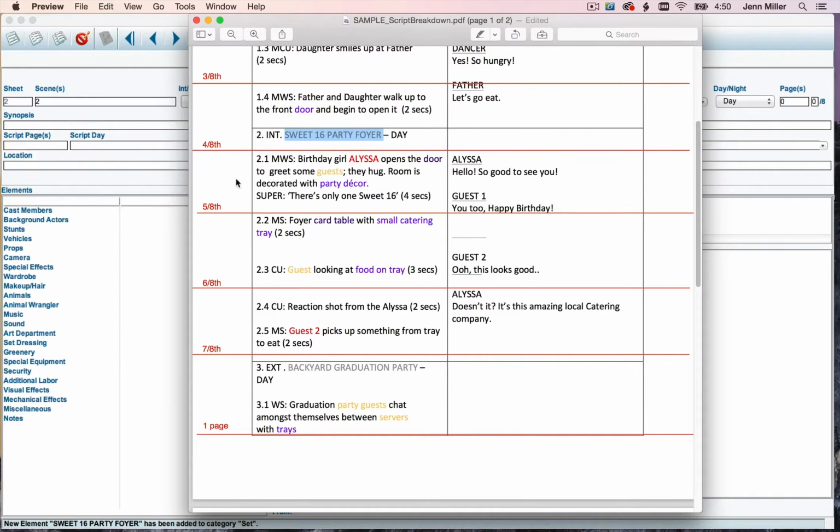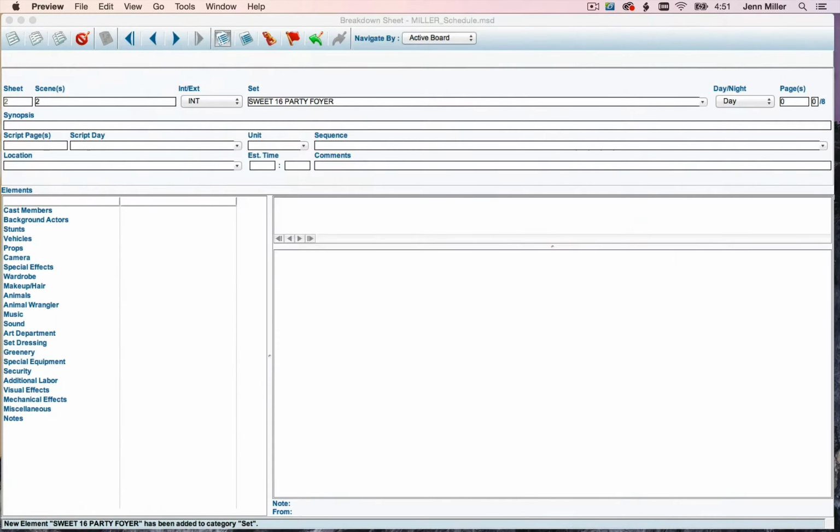So this is 1 to 3 sections and then 1 additional line. So again, this is just barely over the 3 section mark, and I also know that there is no excessive or emotional dialogue or no special effects or anything crazy going on, so I'm going to go ahead and round this to 3/8 as well. So I'm going to go ahead and type in 3.